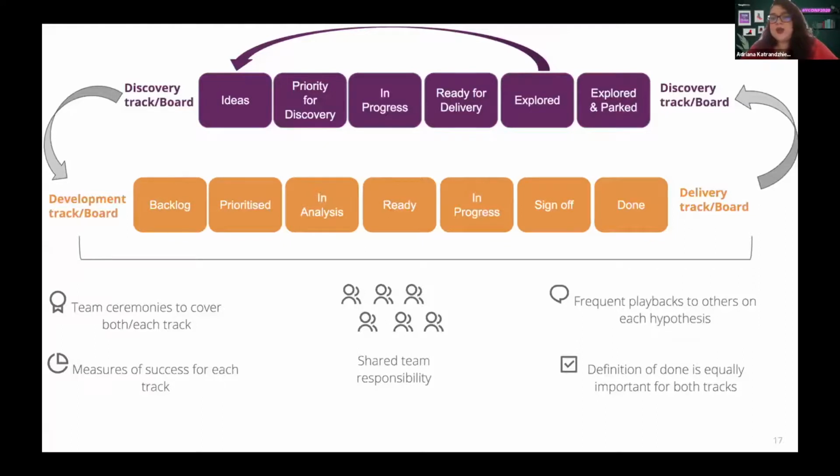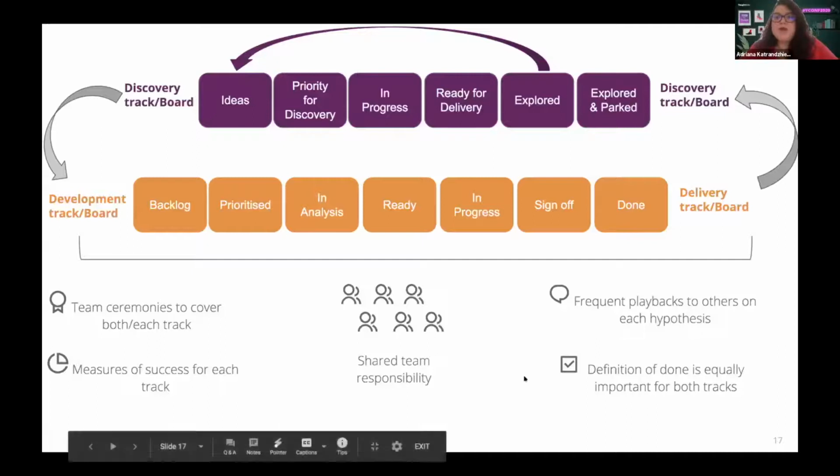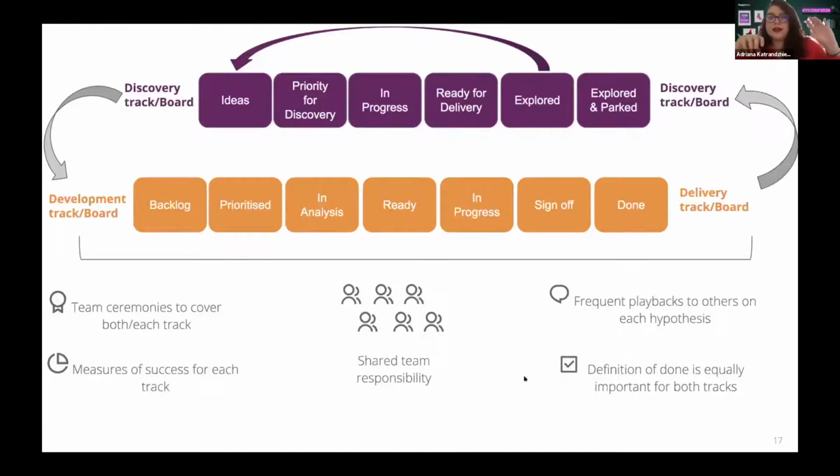And when we had demos or playbacks or showcases to our stakeholders, we always included what is going on in both tracks. So for example, we would include the experiment of the week, what we did, what we found, what's the next thing that we're going to focus on there. And we'd demo some working software at the same time. And that really helped stakeholders to track the ideas from experimentation and deciding that you want to build it, to actually building it and how it looks in real life.